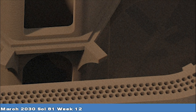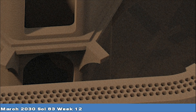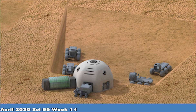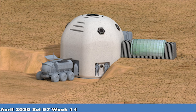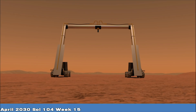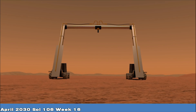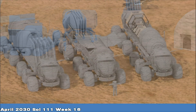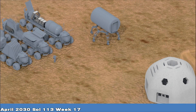To increase thermal insulation, we print a honeycomb pattern within the wall. This produces air gaps that reduce the effect of thermal conductivity. The printed shell structure is then ready to be outfitted. The backfill provides surface-level access to the second floor. Vehicular access to the first floor is provided by the sloped ramp created during excavation. The 3D printer is robotically relocated to the next construction site where construction resources are redirected. Outfitting of the Hexhab begins upon construction crew arrival.